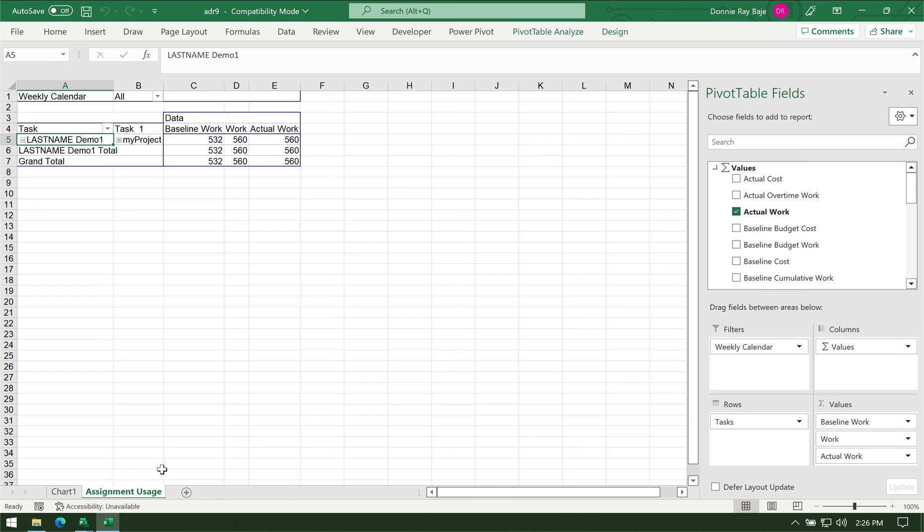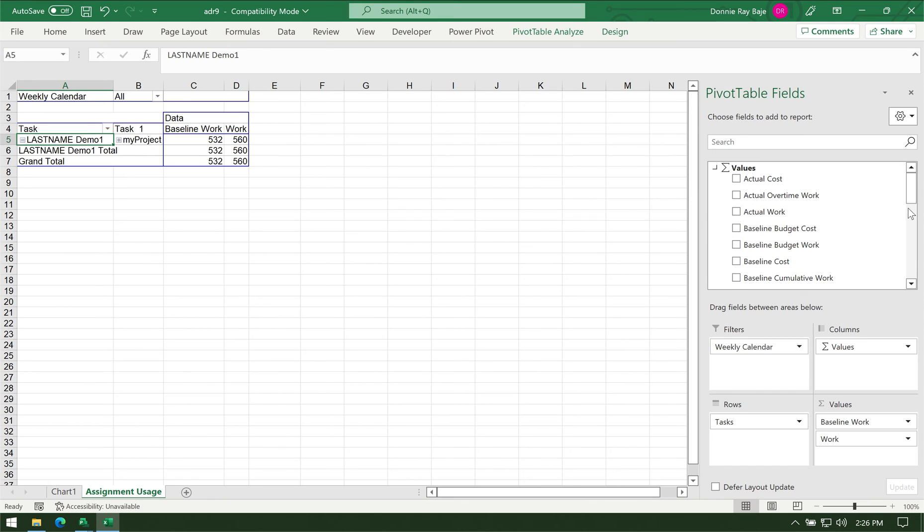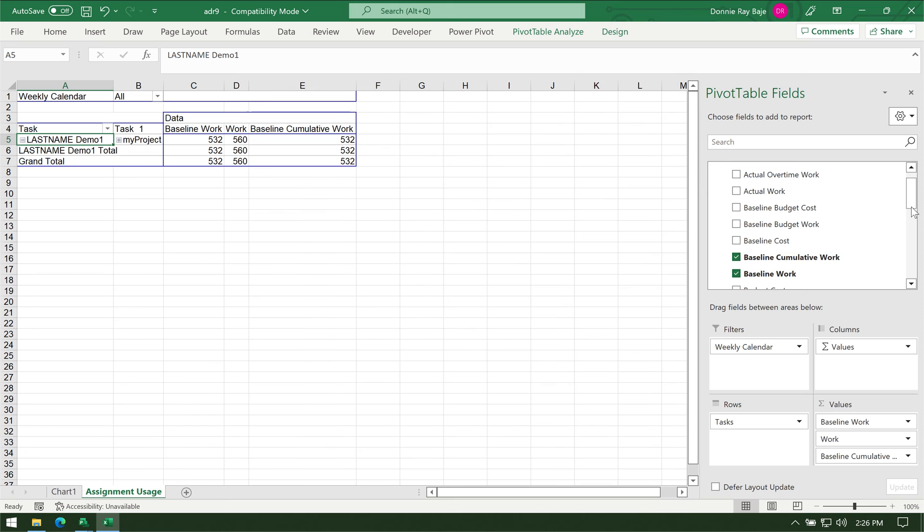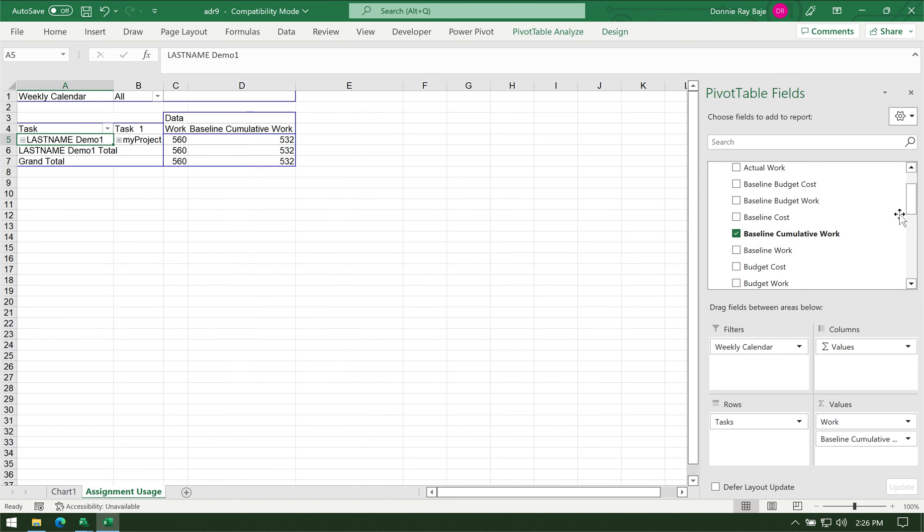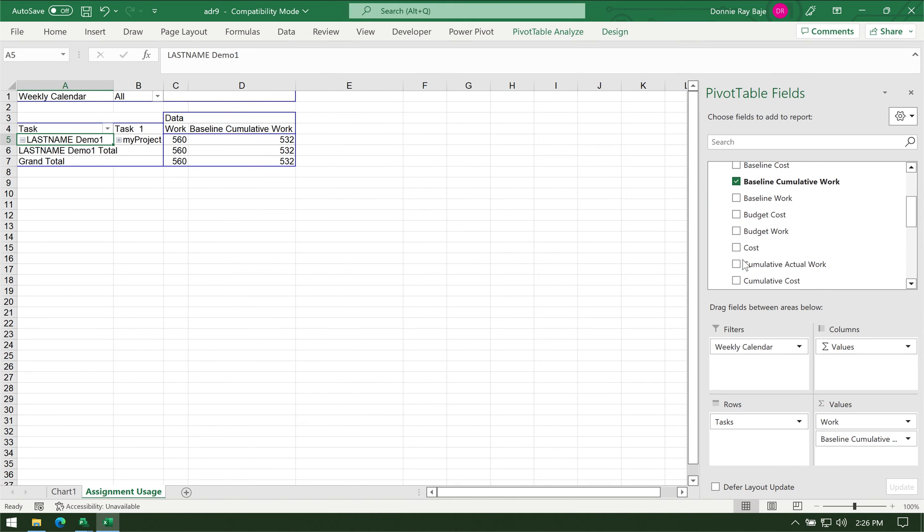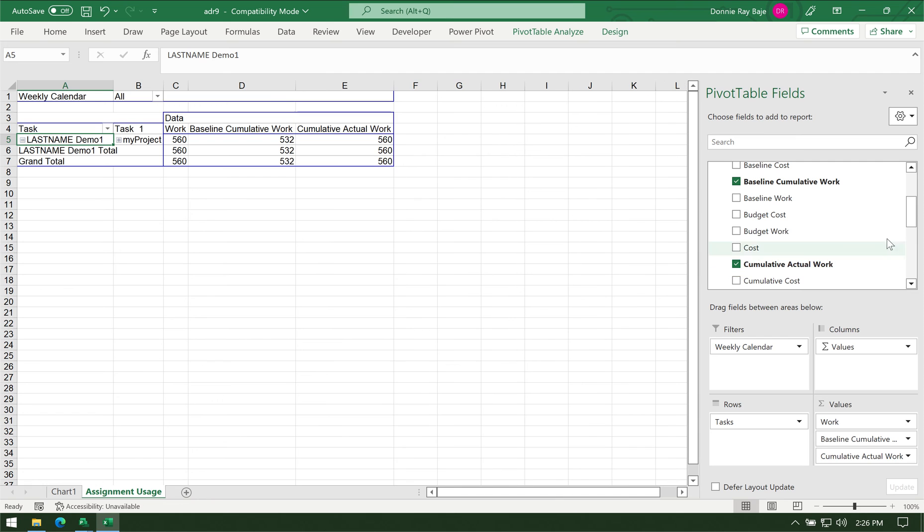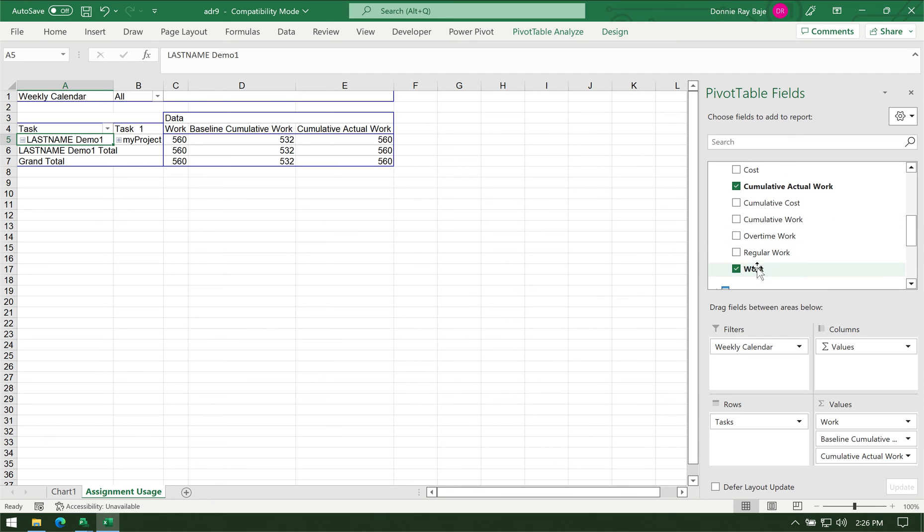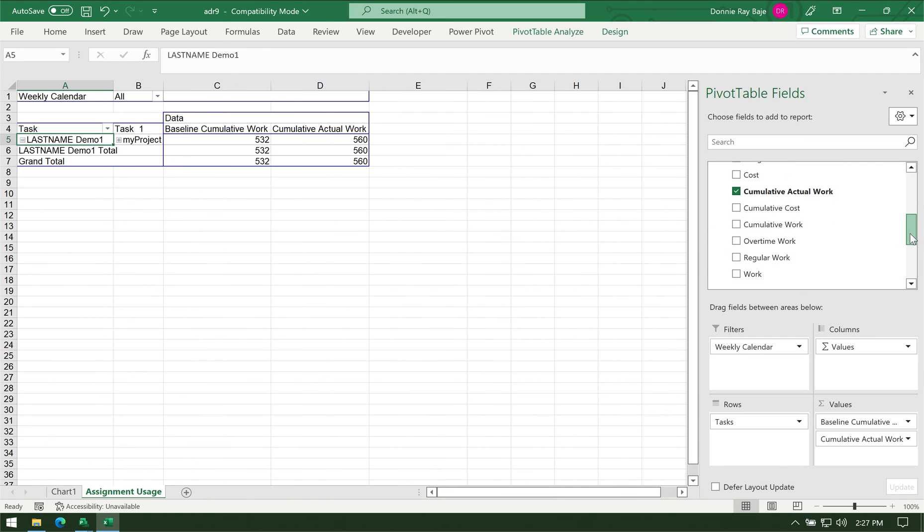In the Assignment Usage tab, that is where we're going to see the classic pivot table that MS Project generated for us. We have to uncheck the Actual Work—we don't need that. What we need is the Baseline Cumulative and the Cumulative Actual. Anything that is not cumulative you have to remove until you only have the two: Baseline Cumulative and Cumulative Actual.